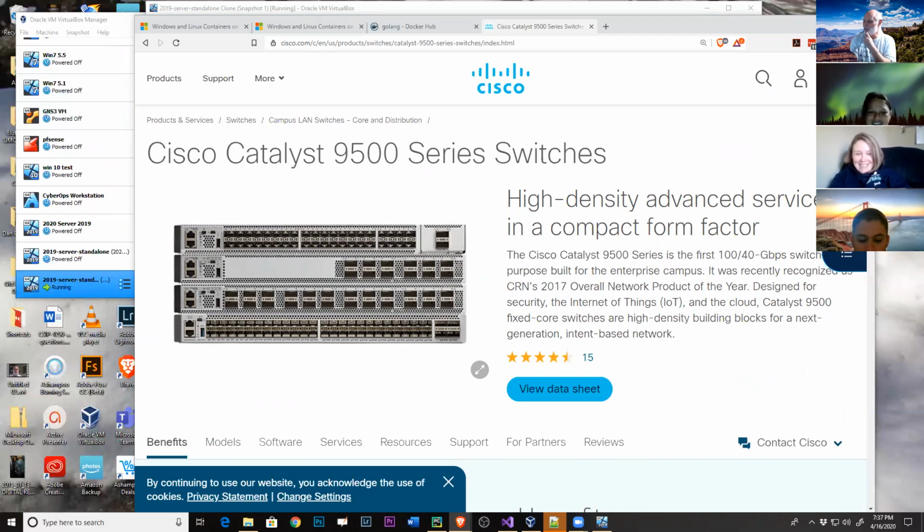Okay. The firewall has a 42-day lead time. The 9500 has an 84-day lead time right now. So if that doesn't get ordered soon, it won't be ordered. If it gets ordered today, it will be in the middle of July. The 9300s, the one with power over Ethernet, has 42 days, 28 days for the one without, and then a couple of the cables, 14 and 35 days for those.